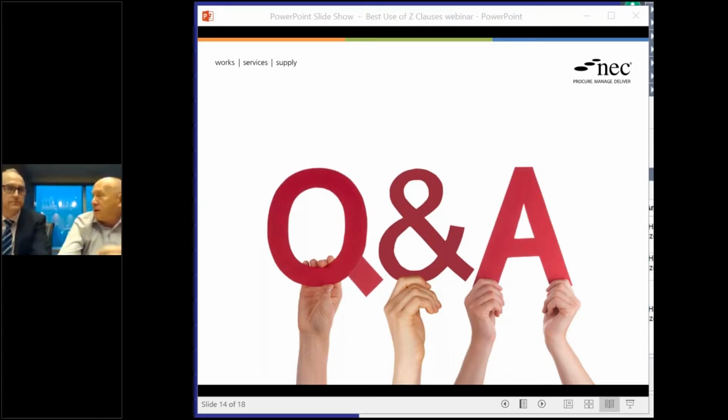I would like, almost a schedule to say, well, Z1 means that I've added $1 million to the lump sum or target cost, and Z2 means that I've added $500,000. Yeah. Do people truly appreciate the cost of risk transfer from one party to the other? Absolutely. And Z3, I have no idea what it's on about. It's so confusing. I've thrown in $250 million just in case, because I have literally no idea.